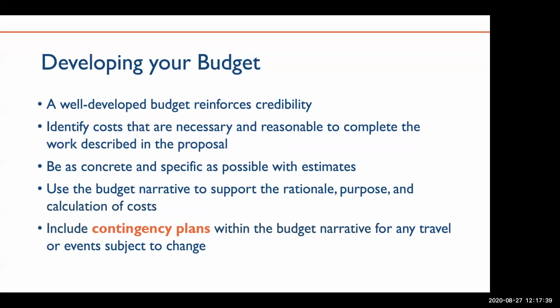And most importantly, please supplement your budget with a well-written budget narrative to support the rationale, purpose, and calculation of cost. The budget narrative should be able to stand alone and provide enough information to the reader to help them understand the program. It should be in-depth and substantiate your costs as necessary and reasonable to complete the work described in the proposal. And finally, include contingency plans in your budget narrative and in your proposal design for any travel or events that may change due to the ongoing coronavirus pandemic or for any other reason.